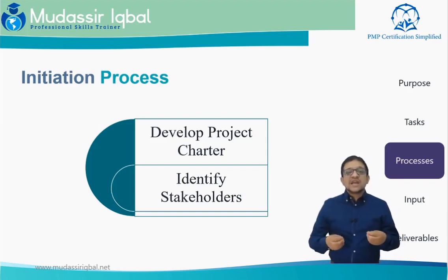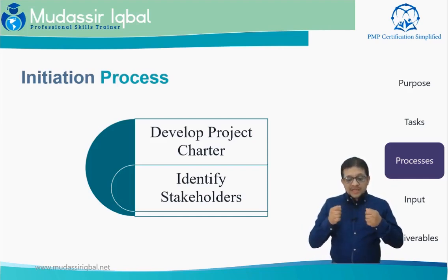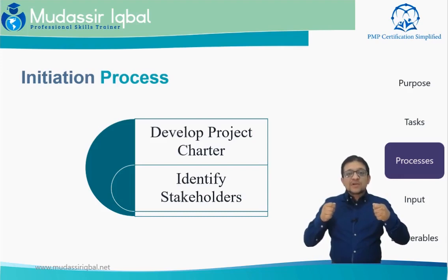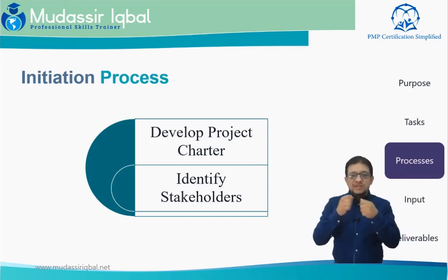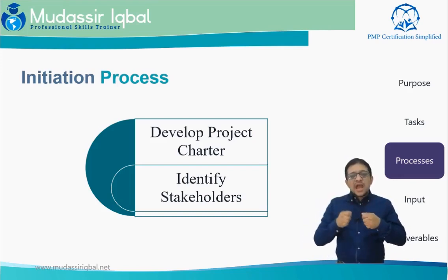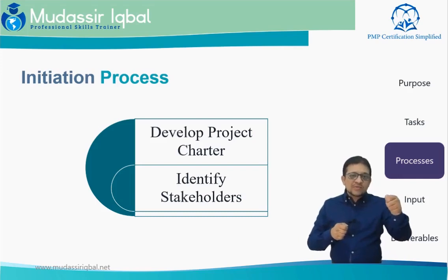this is all part of the project charter. It is to define a new project and phase. It is about getting a formal authorization of project initiation. It's a paper in the hand of a project manager. It's a very powerful paper because when you take this approval, you go to the finance and ask them to give you the money.